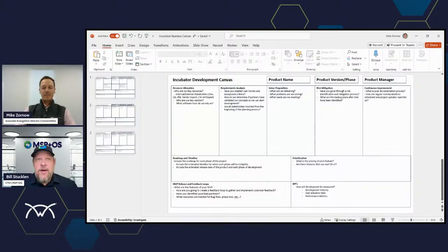Yeah, so we're using Agile. We have our sprints, we have our backlog, we have all of those user stories created before we go into it, and we modify those as necessary. We would always do weekly production meetings, typically an hour, where all the stakeholders would be there, not just the Agile team, right? So that we would have the business unit, the channel. A lot of times we were working directly with the channel people because they're trying to build this channel out. They would all participate in this, so everybody knew where things were going.